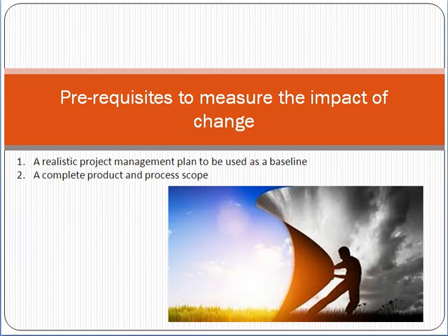Friend, what are the prerequisites to measure the impact of change? First of all, we must have a proper project management plan. Secondly, a documented and proper scope document is required. These will be the major prerequisites to measure the impact of change.